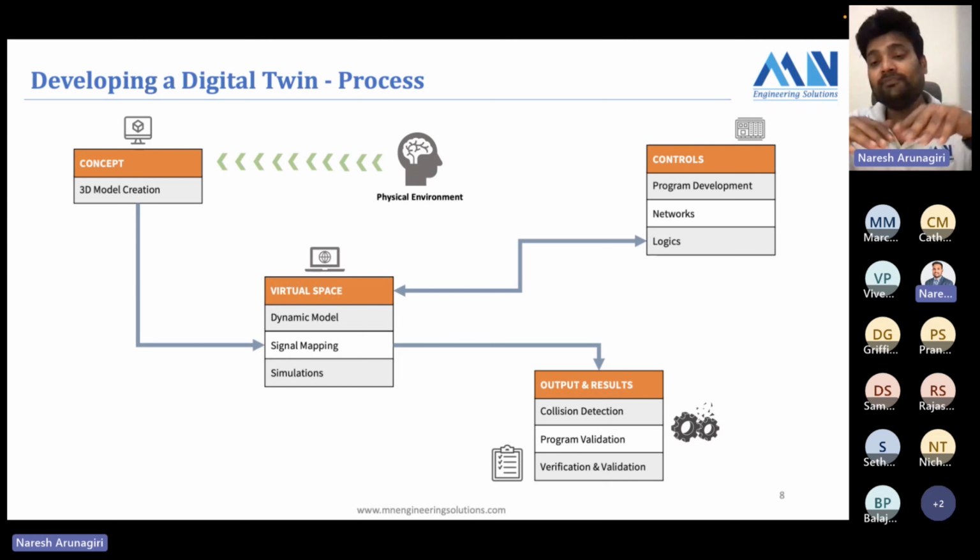So it helps them reduce the time and the rework at the end. When you figure this out at the end, when you put the machine together, you got to scrap the part or do the modification and then fix it. In some areas we felt it could not happen when the machine is designed as intended, but we had to tweak the software program. All these things, we were able to do while they were putting the machine together. So that's the first result that we got, the collision detection.